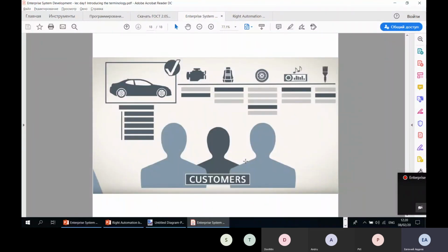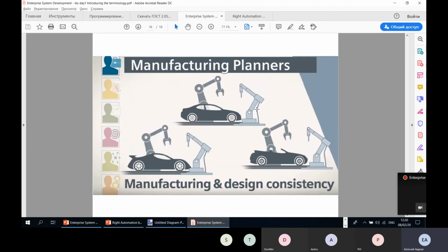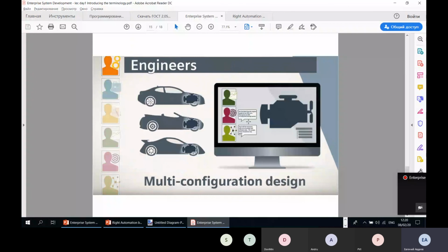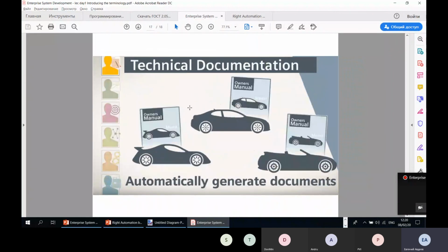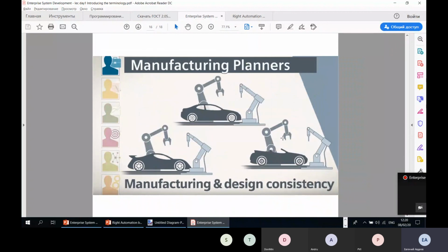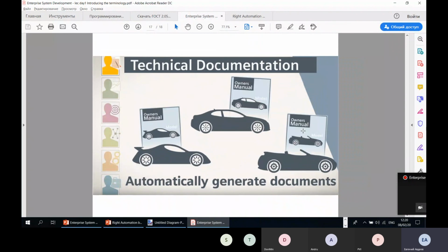And what is the difference? One of the differences between having just a software product and having a complex software and hardware product is that in software it is much less expensive to make changes. But with this complex product, when we find a mistake but we have also made manufacturing planning and it's in manufacturing, we cannot easily change something.